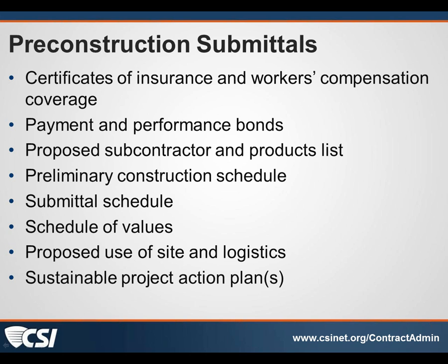Typically, especially on jobs that are large in size, it takes a while to get the subcontractor's information, the primary subcontractor's information pulled together to be able to create a construction schedule. Some of the projects Doug and I work on require manpower loading or cost loading.